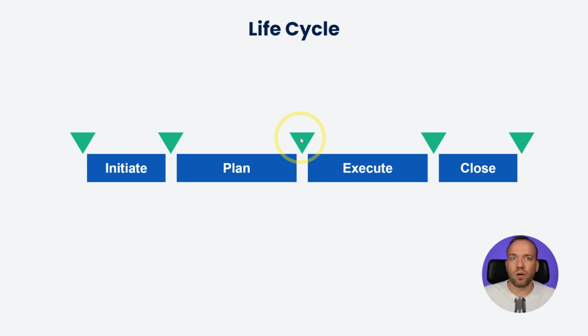From the tool point of view, you need to make a difference between a gate and a milestone. A lot of people, actually even professional project managers, use those interchangeably. You have to understand that these are different. A gate is a forward-looking decision point. A milestone is a significant point in the project. Gates many times are predefined. Milestones are up to the discretion of the project manager.